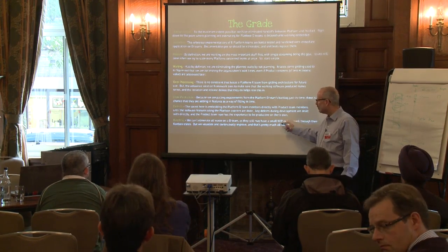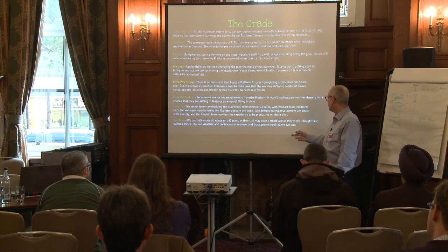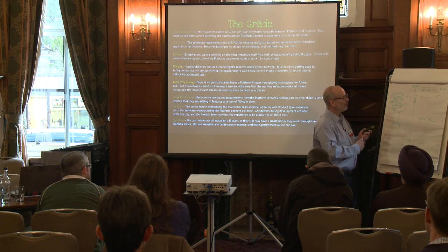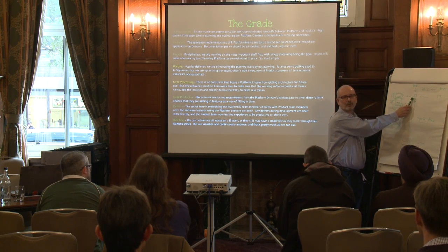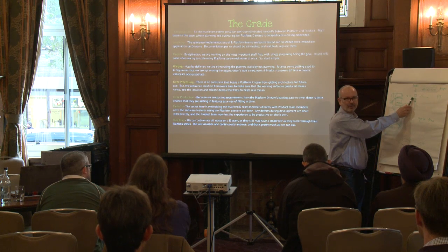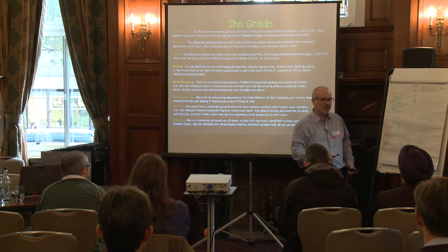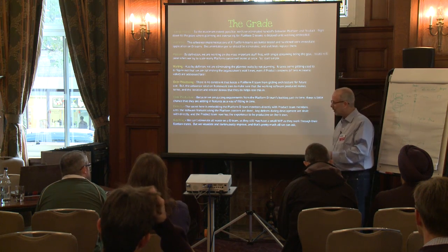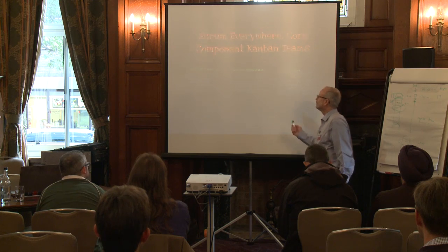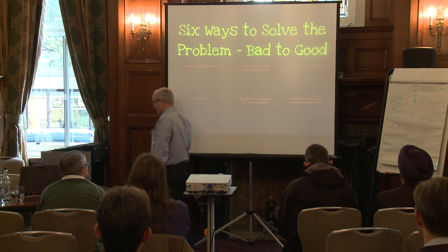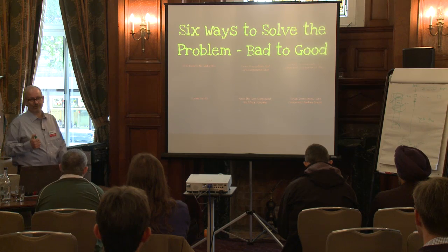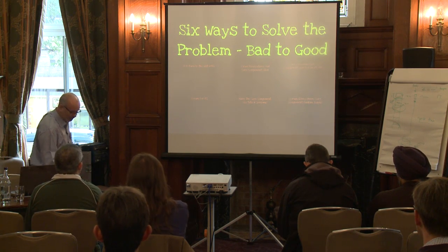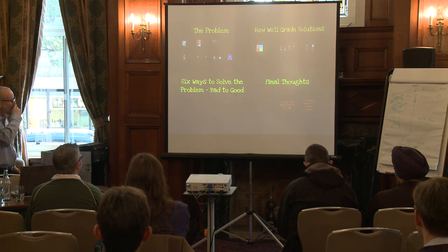Batching, yeah, there's no way to eliminate all the waste on the teams, but we've limited the WIP, right? I should have said that. A squad that's available can't take on more than one thing at a time. You can only embed with one product team at a time, if you didn't catch that. So batching gets solved. It's kind of the different ways of going about it. Like I say, I've tried all 6, failed at 5, guilty with an explanation. The last one works pretty nicely.